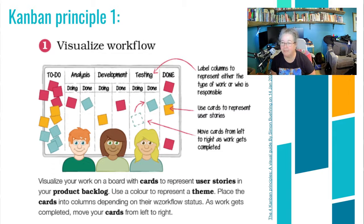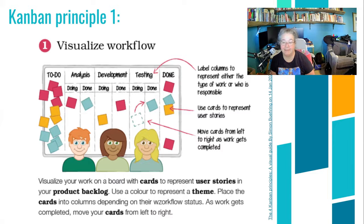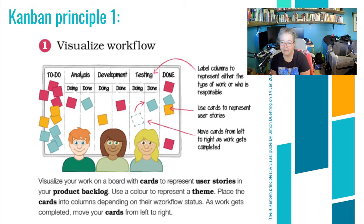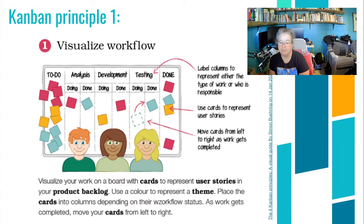Once you label those columns, they represent either the type of work or who's responsible for the work. Cards are talked about as stories, bringing in that empathy piece of design thinking where you're thinking about the end user and how your product or deliverable will help improve quality for that user story. We will move Kanban cards from left to right as we read, so that work gets completed along a timeline, and everybody on the project team has the ability to create these little cards and also move them around. Once we visualize this work, we can use color to represent a theme and place the cards into columns depending on their workflow status.